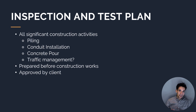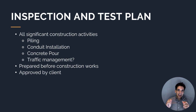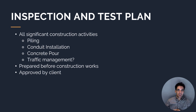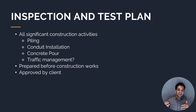All ITPs need to be prepared before the construction works begin, and importantly, they need to be approved by your client or relevant stakeholders before the works begin. That's a critical point — we write an ITP, document how we're going to check everything's been done correctly, and we need to get our client to review these to ensure that they're happy with them.